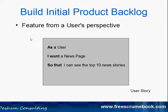Typically, the way we phrase a user story — which is essentially a description of a feature — is from a user's perspective. An example would be: 'As a user, I want to see a news page so that I can see the top 10 news stories.'